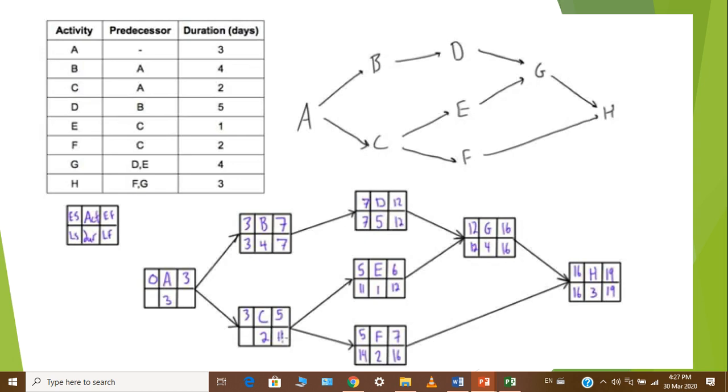Again, I am repeating a little of what happened in that video, but I just want to bring back a focus to certain things. Where it can get confusing is the difference in how we select from left to right, and backwards from right to left, working on our late start and our late finish. So if you look at our left to right, we are looking at our largest out of two possibilities.